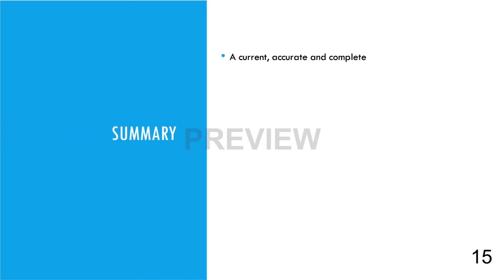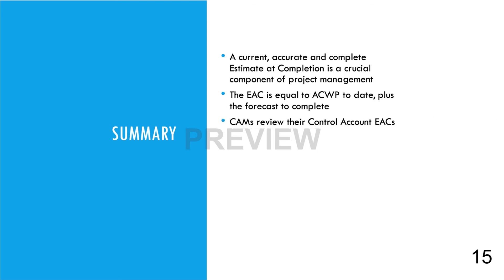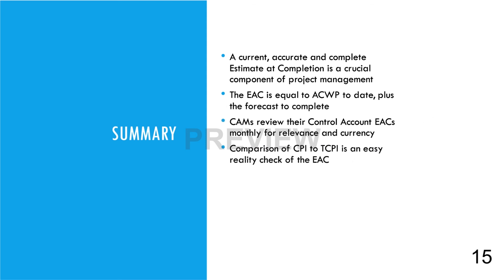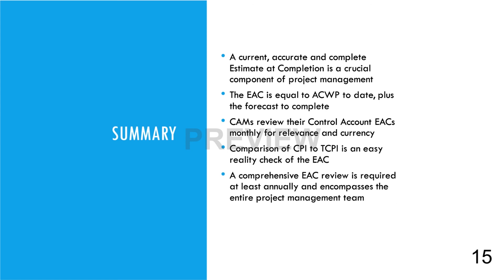In summary, a current, accurate, and complete Estimate at Completion is a crucial component of project management. DOE depends on its accuracy to manage funding. The EAC is calculated by adding the actual costs incurred to date plus the forecast of cost, or ETC, to complete the remaining work scope. The CAMs are required to review EACs for their control accounts monthly for relevance and currency. The primary driver for changing the forecast of costs is realization that the current ETC is no longer realistic, and a comparison between the CPI and TCPI can be a quick and easy reality check of the EAC.